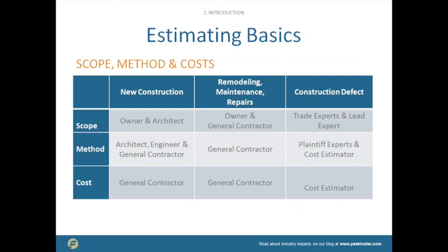And I can tell you that the biggest and the best construction companies in the world are the best at construction cost estimating, because they literally build that project, including the scope and the budget and the schedule, before they get out into the field. And then when they're in the field, the whole time they are comparing their actual performance to that plan. The estimating process is the planning process. And they are the best because they exercise the discipline to first make an amazing and detailed plan, and then to compare their performance to that plan, and they learn from it continually.